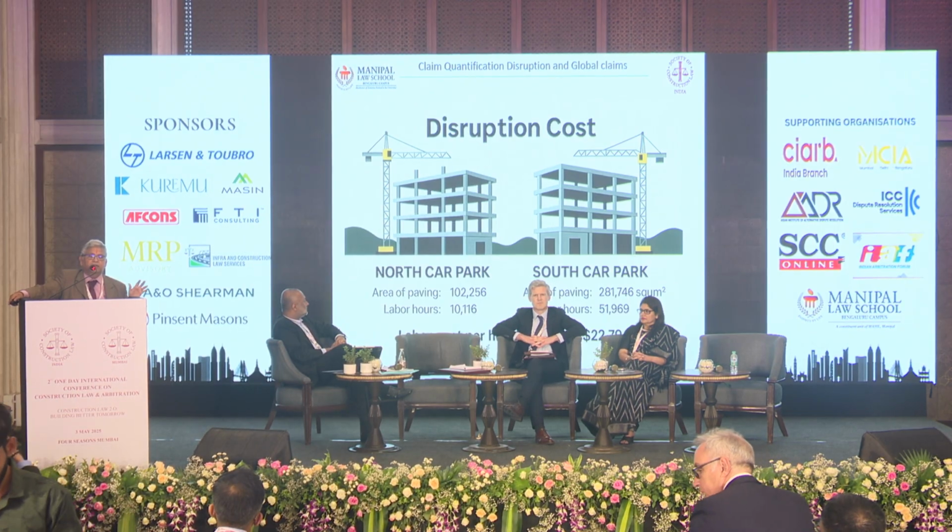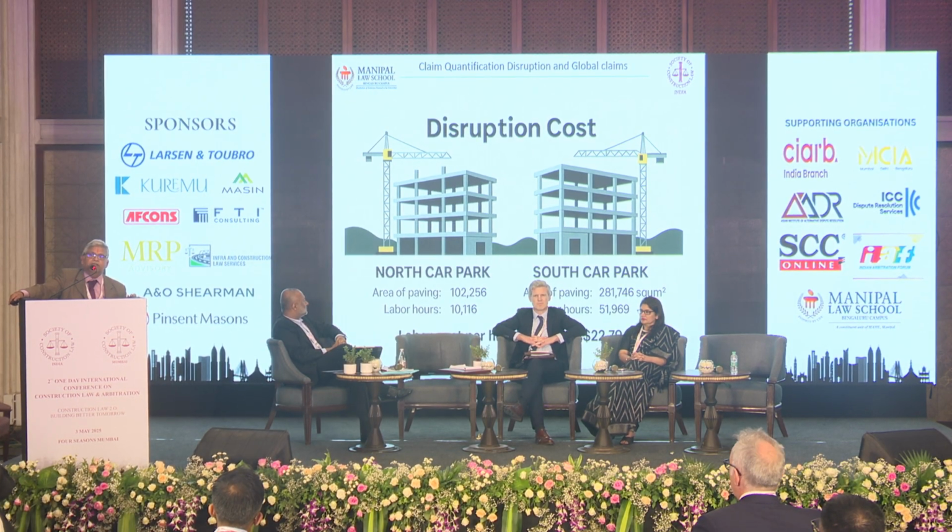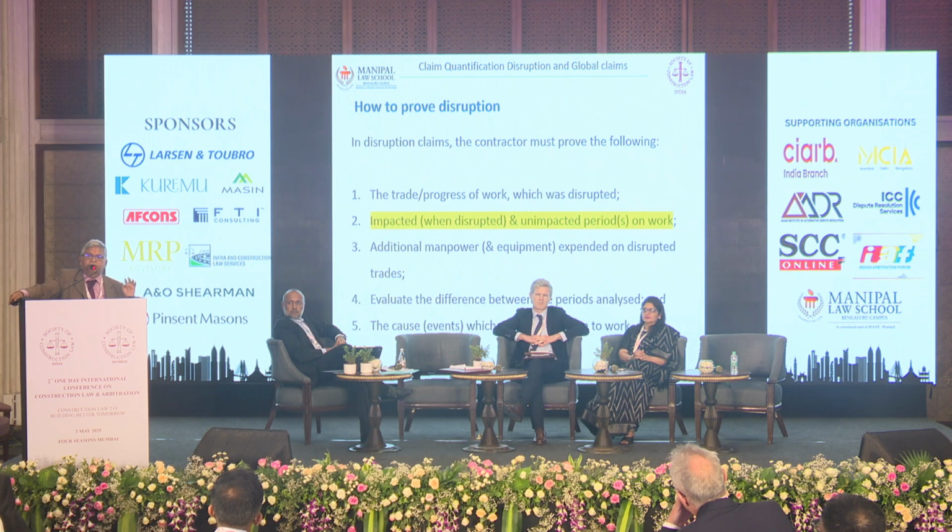So this is actually not a fictitious one. We were doing the Yas Mall project in Yas Island in Abu Dhabi. There were two car parks. One of the car parks was close to the Marina circuit, the Formula 1 circuit, where we had frequent disturbance by the employer because the race was going on, or some VIP visit. Something or other, we were asked to stop the work and restart. So between the one car park which was not disrupted and the other car park which was frequently disrupted, this is how we were calculating. I will show how that is being done.